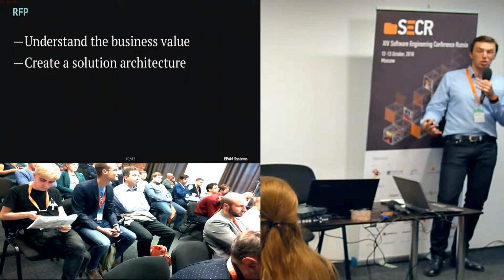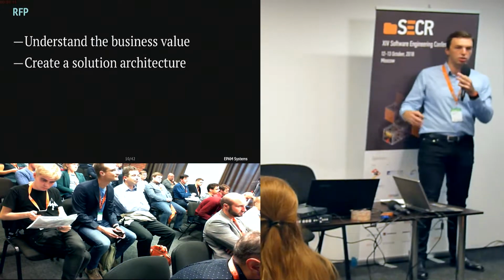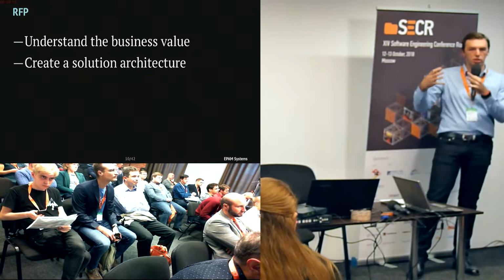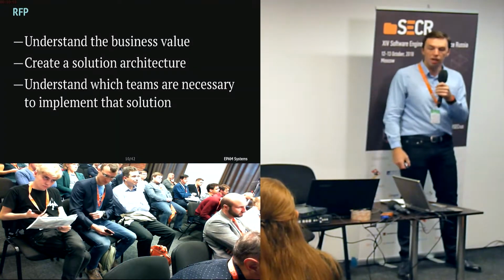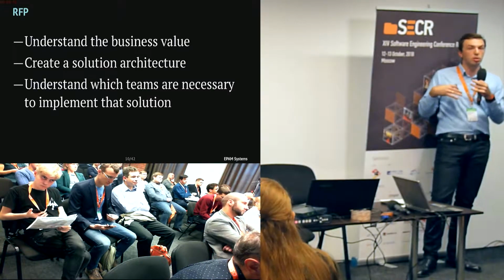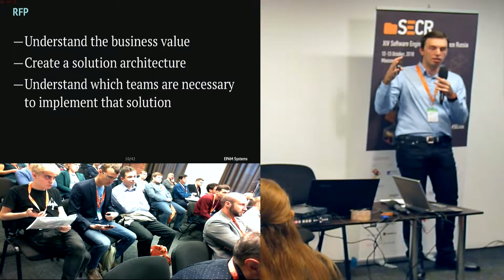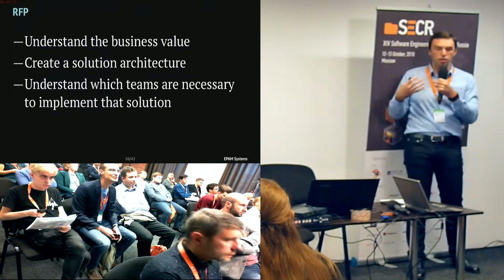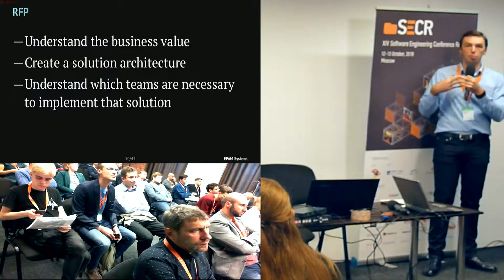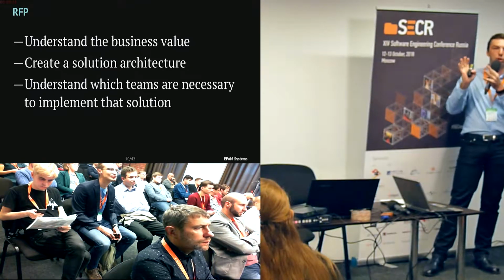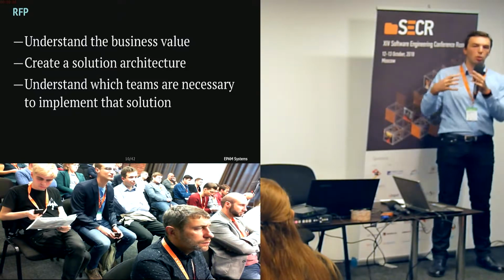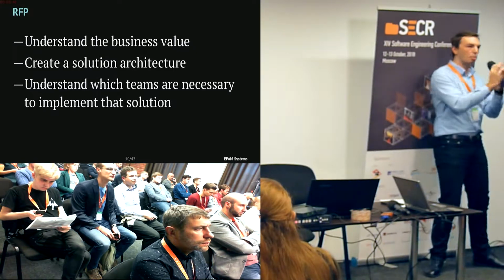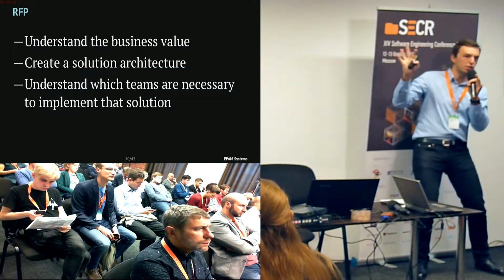Then the architect is going to create a solution architecture, right? To draw some fancy diagrams, to understand which components are required for that solution. And if the architect knows which components exist in that architecture, then he can understand which teams are required to implement that solution. Because you don't generally do only one part. You're creating a system, right? So you will need a backend, a front end, a load balancer, a mobile application, a website, a data storage, and so on.